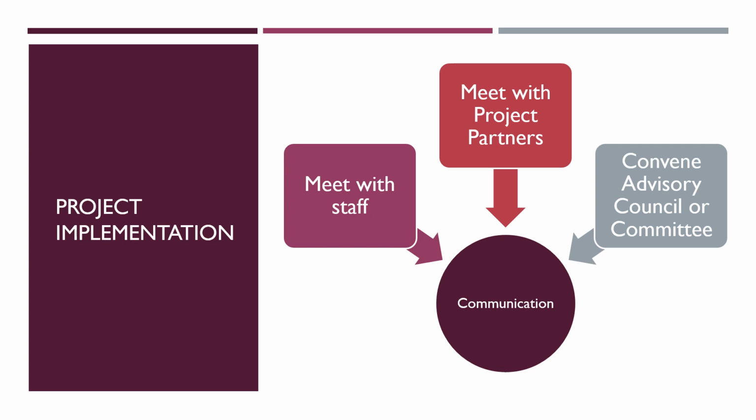In many cases, a new grant finance code will need to be established during the initial implementation phase. Communicate early with your finance office about the steps for this process. You may also want to establish a set meeting schedule with this department to review expenditures and the budget as the project progresses.